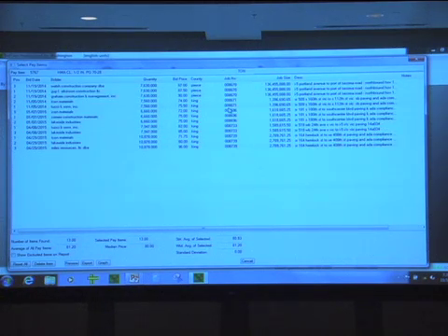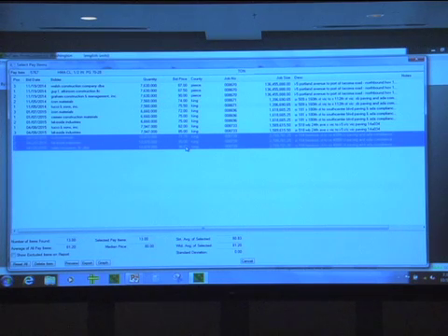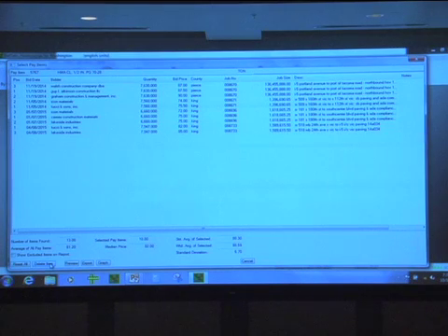And when I sort them by my job, I can see that this one particular job has my low and my high. Now there's something going on here. You know, there's something I don't know about what's affecting these costs. So I'm going to go ahead and delete that whole job, because there's probably something wrong with those prices. And then our average has been reduced down to about $80 a ton by doing that.